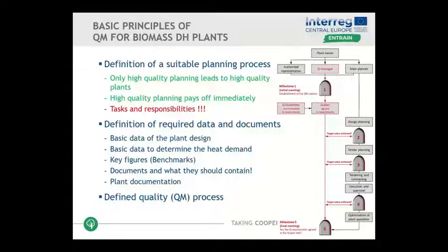Another major part is that we have a clear project structure in milestones, and within each of these milestones, there are requirements of data and documents. This is clearly defined. Which data you have to provide at which stage of the project, which documents you have to provide at which stage of the project. This is very important to avoid a lot of mistakes, to have a high quality planning.